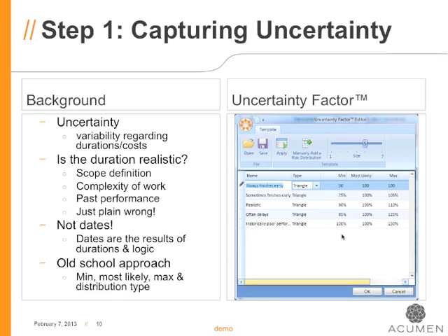That 300 days is being driven by a risk event, in which case the risk event needs to be captured in the risk register. So by adopting this uncertainty factor approach, it's providing uniformity within the team, so everyone's working to the same scoring system. And secondly, it's avoiding very heavy skews, and those skews, like I say, are typically or normally risk events anyhow.